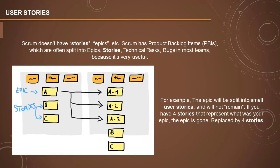The next work item type is user stories. We know about themes and epics; now we look at the next level of breaking down the system, which is user stories. Scrum generally doesn't have stories or epics as per the Scrum Guide, but Scrum has product backlog items, or PBIs, which are often split into epics, stories, technical tasks, and bugs in most teams because it's very useful. From the product backlog items, we derive and put them into epics, stories, and tasks — all of which are work item types of Scrum.